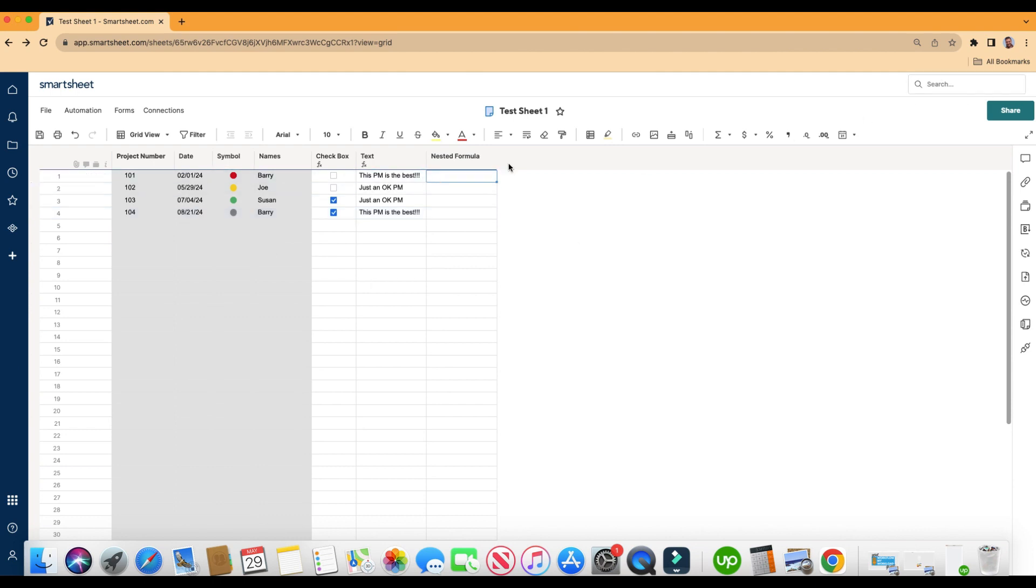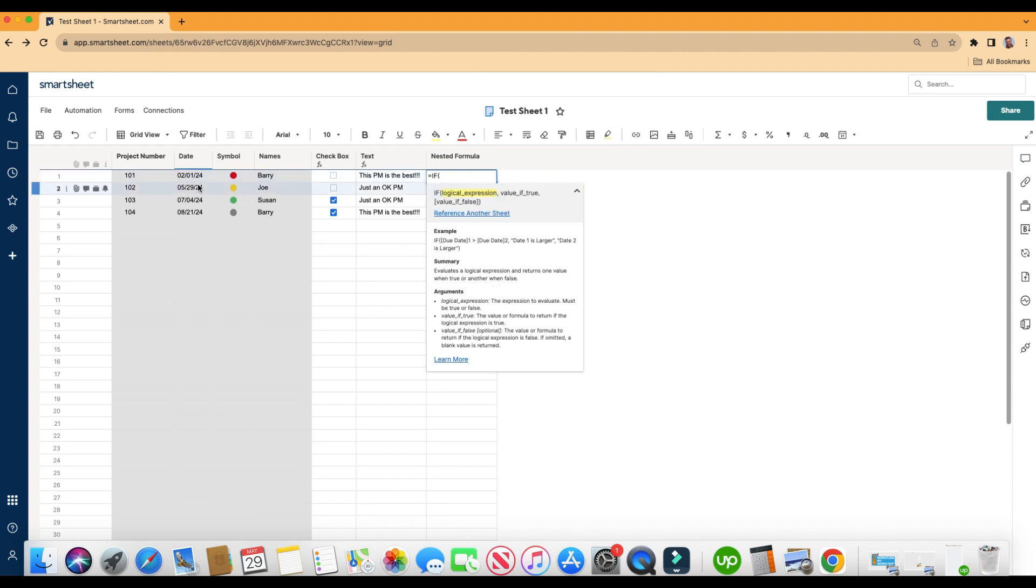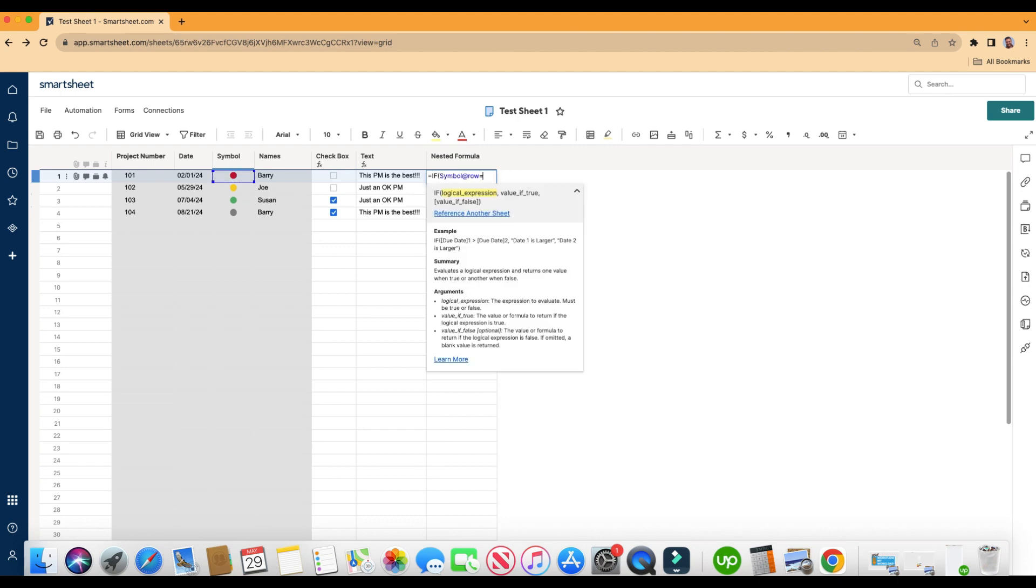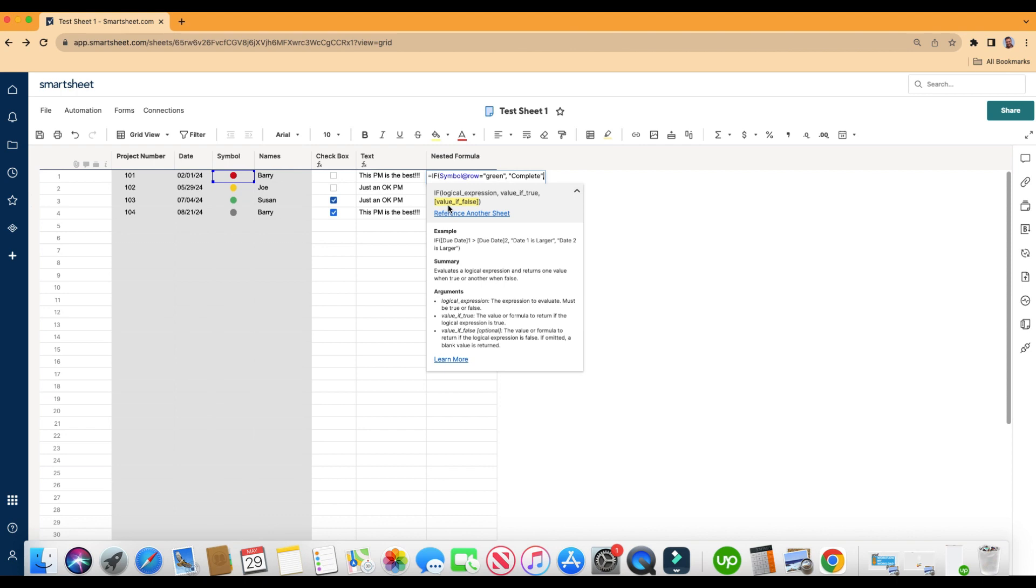I'm going to go ahead and clear, equal sign, we'll do if. We'll say, let's click on the cell here in the same row. If the symbol equals, and we have to be in quotation, green. The true value, so if it's green, then we want it to say in quotation, complete, comma. But if it's false, and the false value here, it's going to have to be something other than green, but we have multiple options. So this is where you put a nested formula, a nested if formula inside an if formula. So for the value, if it's false, we're actually going to put in a new formula. Start typing in the word if.